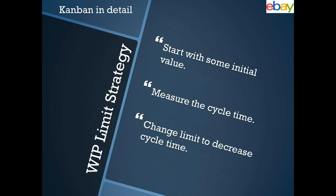The next strategy is the work in progress limit. How do you limit it? Start with some initial hypothetical value — a good start is the number of engineers on your team. If you have three engineers, start with three as your initial value. Then measure the cycle time: how long does it take for all three tasks to release? Then adjust your work in progress limit to see how you can improve your cycle time.